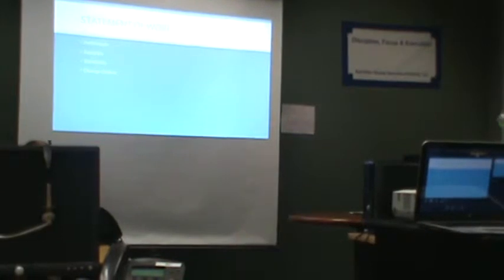Okay? Cannot do the work and then ask for a change order. That's like saying you want a dress, you bought a dress, and then somebody telling you the price is twice as much. Wouldn't like it. Same thing. Can't do the work and then ask for the change order.